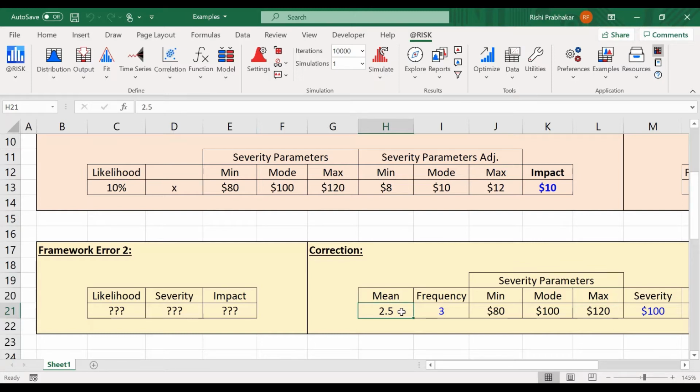So you say, oh, look, what's the average going to be? And just note that that's different to how many will happen, because how many can only be an integer, but the mean could be fractional, some decimal. So instead of saying everything has a likelihood, because it doesn't, I say everything has a frequency. I mean, that's still not quite true. There are things that don't have a frequency. So what we're focusing on today is things that can be counted. So it's got a frequency.